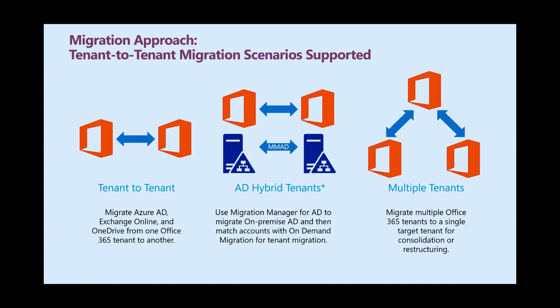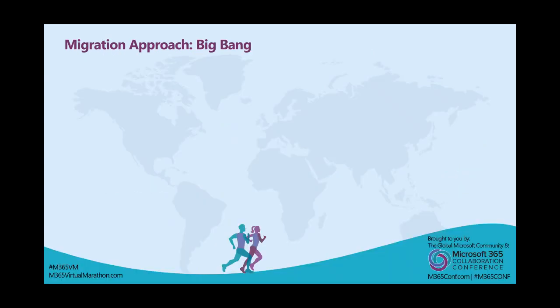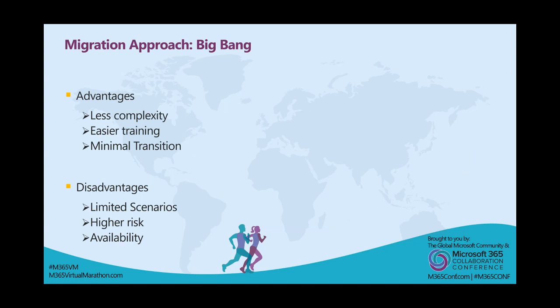A lot of enterprise customers definitely want to go hybrid. And now we're talking about different approaches, how to do a migration. And one is the Big Bang. And Big Bang is very popular because it's very easy for the change management people, because the Big Bang is usually like Friday night to Sunday night, because Monday morning, 8-9 o'clock, every end user has to go back to work and work on a new migrated system.